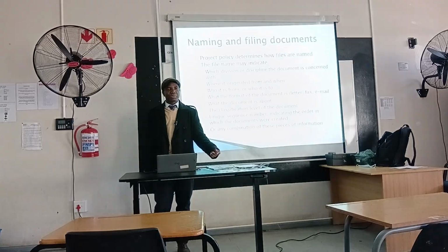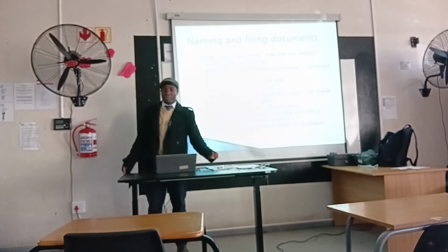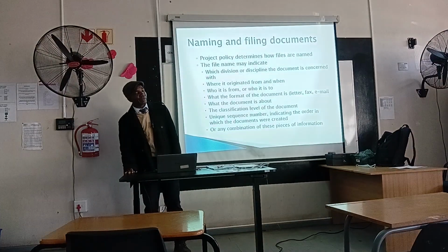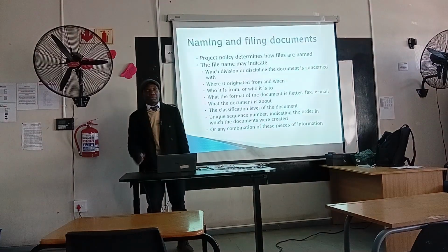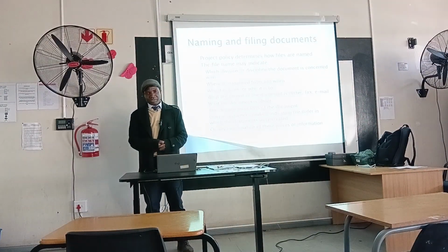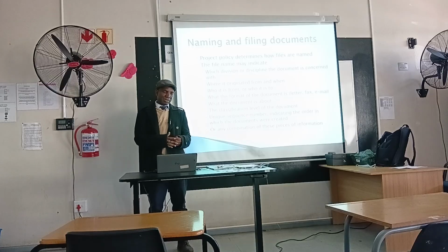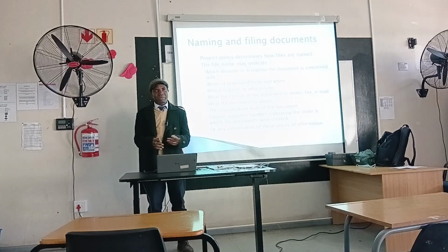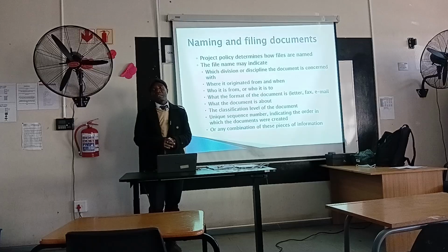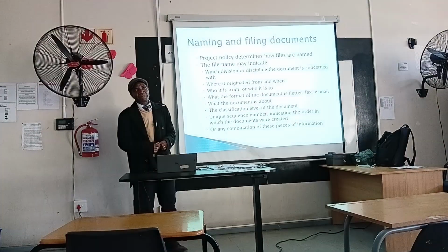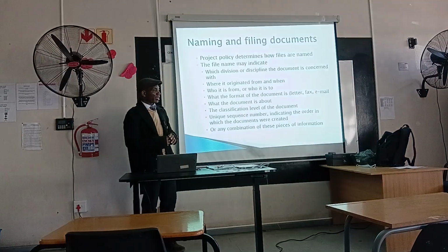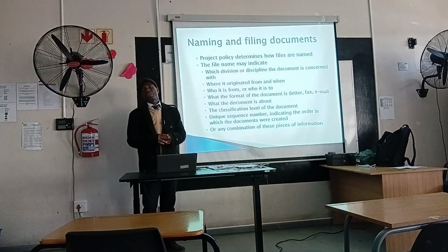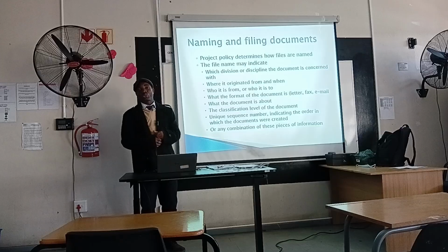For example, in a project environment, you come across different disciplines. In a construction project, you have a structural engineering discipline, the precast section, or you could have the electrical, mechanical, and those kinds of things, right? So documents that pertain to each discipline need to be named and tagged appropriately so that you can know which is which.